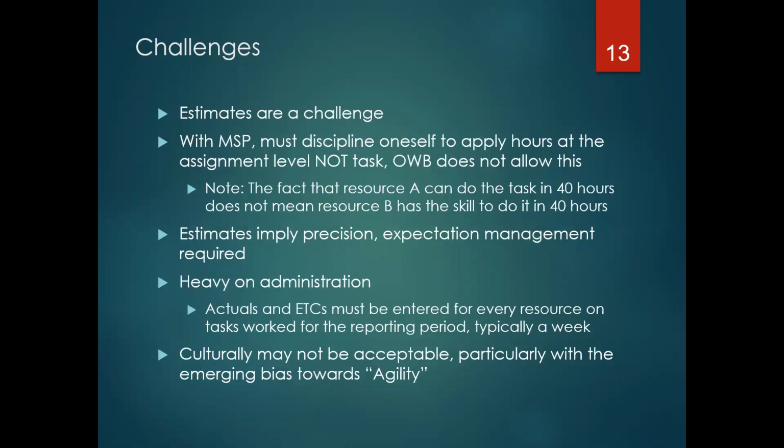Estimates do imply precision, so you need to manage the expectations. If you feel like your estimates are soft, that's fine. Just manage that expectation and make sure that you request a change bucket or a variance or a contingency that takes that into consideration.